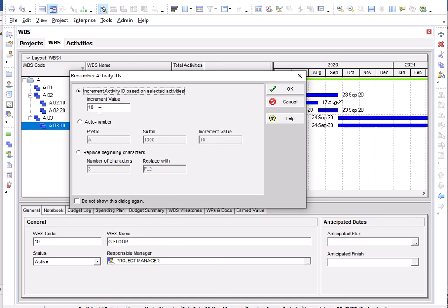We can change this, but let it be 10, because when we detail any activity, for example reinforced concrete, it can be carpentry, steel erection, many jobs, then concrete pouring, and after that the shuttering. We have 10 days between them for the shuttering to be removed, so now we leave it at 10.